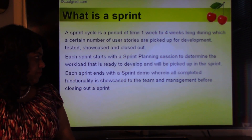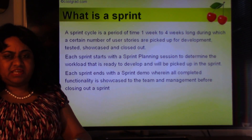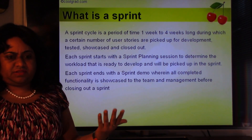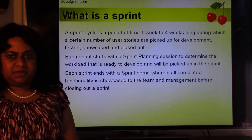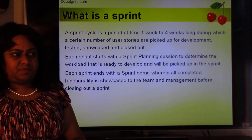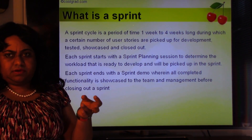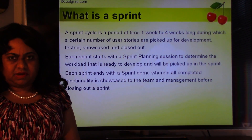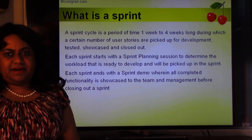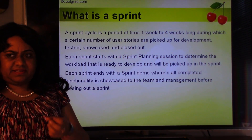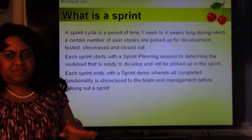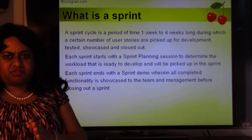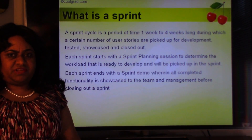Each sprint ends with a sprint demo where all the completed functionality is showcased to the entire team — product owners, business analysts, QA, dev leads, technical architects, and the scrum master. Business analysts or QA leads usually showcase the completed functionality. If there are P1 or P2 defects open, we probably can't close out the story, but minor defects are okay. If they're happy with the functionality, the stories are closed out at the end of the sprint.